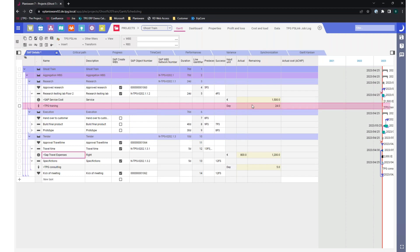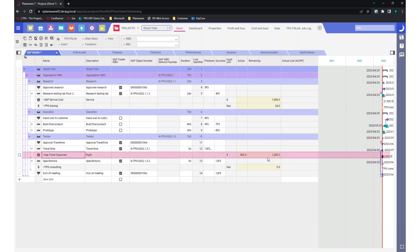Now I, as a project manager, have the possibility to react on this. This is where the work of a project manager actually comes in. I can see I planned 1,200 euros and spent 800 euros — is this okay? Do I need more budget? Maybe everything is fine. Now I have the information, and when I need to talk to someone else, we all talk about the same piece of information because we have it in our systems. The controller sees this in SAP, I see it in Planisware — we have the same data and can now steer the project. I can change it here, synchronize it back to SAP, and the cycle starts over again.